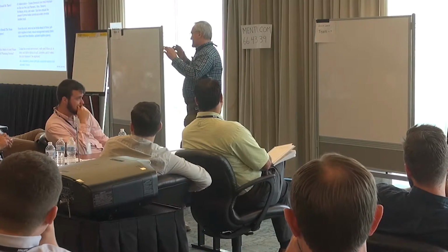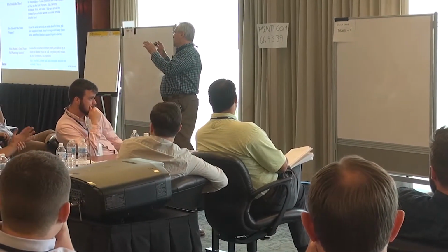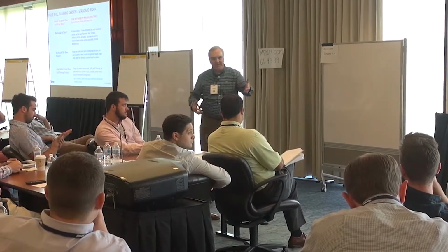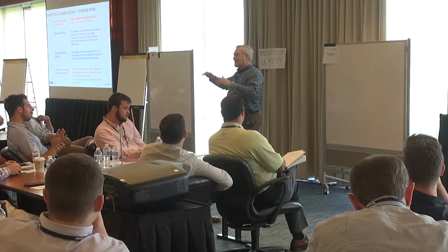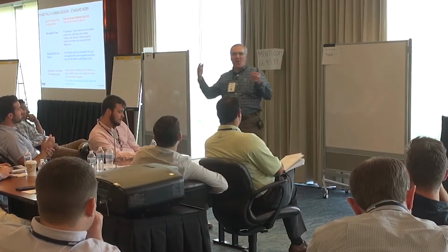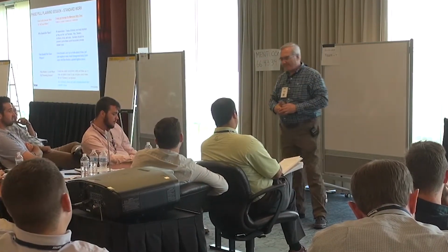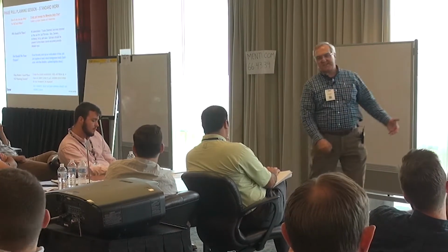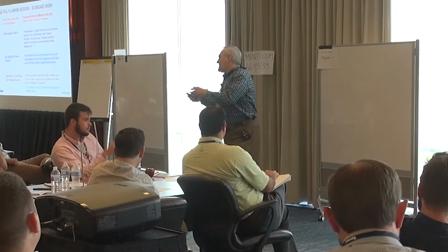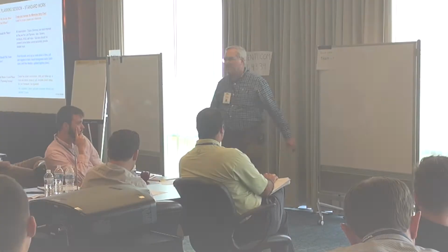A lot of times it's too long because they took too big a bite to do a phased pull plan. And we've heard this from our competitors. I'm not sure if it ever happened at Gilbane, but they tried to do a pull plan for the whole job. So you got the trade sitting in a room for a whole day. That is painful. So Gilbane doesn't do that anymore? Good. Yeah, so we suggest chunks of work that are maybe 6 to 8 weeks long, which will help you keep your meeting to 3 hours or less. So that's a rule of thumb.